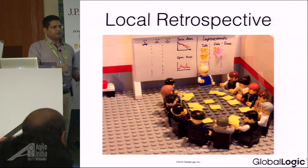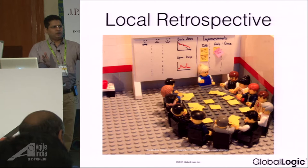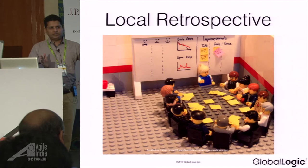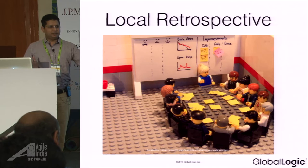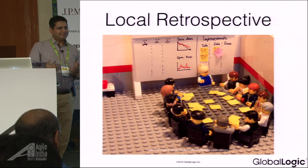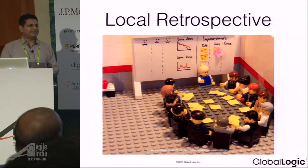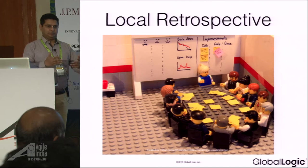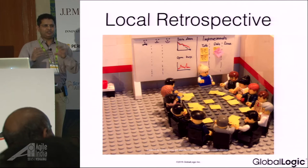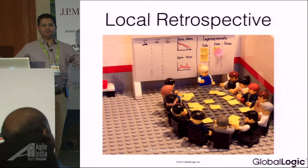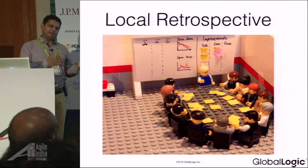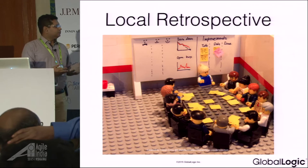What we started doing was holding local retrospectives focused only on local problems, and that paid huge dividends. For a customer, the only way to see how the team is doing is through the distributed standup, for example. Consider a situation where there is a very introverted person who doesn't speak much, and another very extroverted person. The introvert works a lot but can't speak up, while the extrovert doesn't work as much but speaks very well in front of the customer. We had that situation in our project but couldn't discuss it in the distributed retrospective, so we started having local focus to resolve those problems locally.